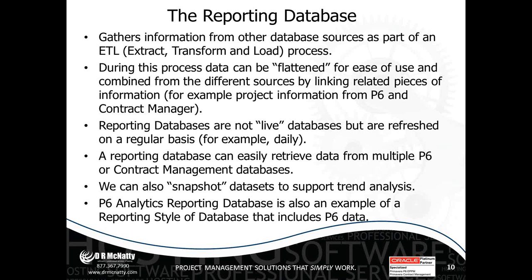Anyone that's tried to do reports directly from the P6 database knows or has found out that some of the information that we see on screen isn't stored in the database. It's actually calculated for display on screen. But using an ETL process, we can do that same calculation but turn it into data and store that data into the reporting database so that it's easily available for use with report writers and in graphic dashboard tools. Okay, and that's what the flattening of the data is all about.